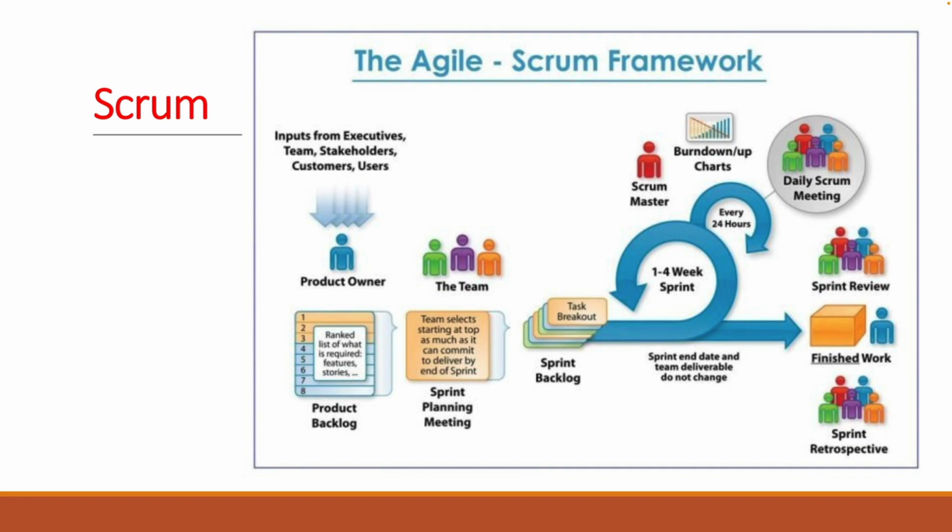So we have this daily scrum to solve this problem. It's expected that you're going to meet every day. So you don't have to sit with your pain or your problem for days on end, waiting for the project manager to become available so you can meet with them. No, there is a set meeting every single day. It goes on for only 15 minutes. You got to get it out. Everybody got to get their blockages out within that 15-minute time period. It's not going to go over that.